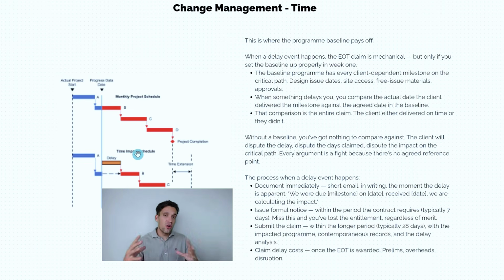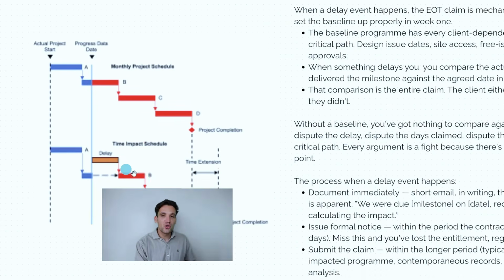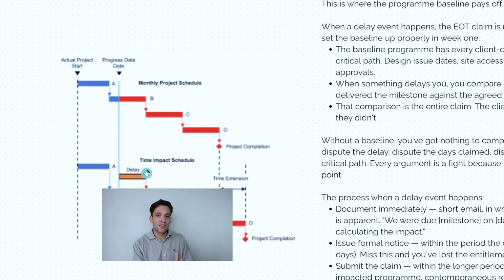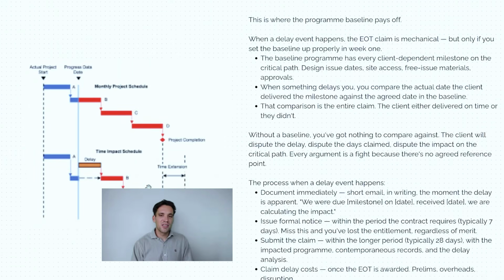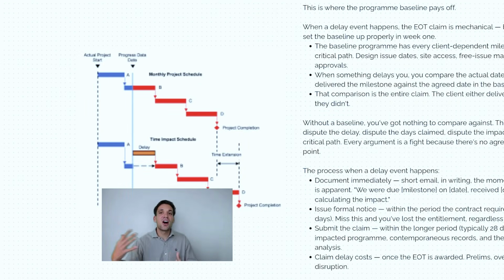But if you can show the earthworks are on the critical path of the project and this extra 4 weeks to deal with this unidentified service is going to push back the completion of the project, you can push back your liquidated damages. So extension of time claims are where you show, based on the original baseline schedule, there has been some delay event that wasn't in your original scope, and you can push back the completion of the project. Well, there's really 2 reasons this is an important concept to understand. So number 1 is going to be like the time aspect. If your practical completion date is the 15th of July, you can push it back to the 15th of August, which pushes back when you're going to incur liquidated damage.